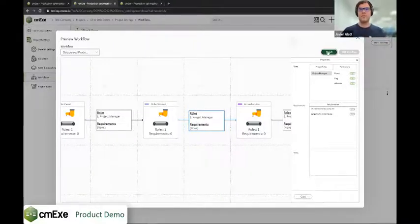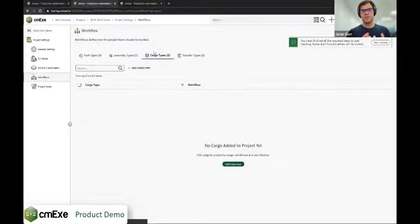So this is a way for you to build in a system where the user cannot move it to the next status unless they fulfill a certain requirement, right? And that's all stored in those tags, and you tag it now very, very quickly, so you can set up a job coming from Inventor versus whatever other software in less than 5 minutes.